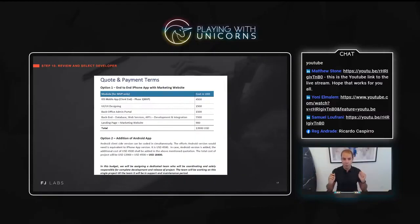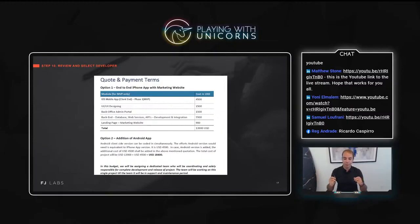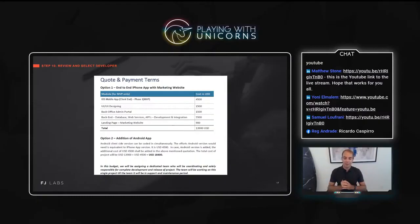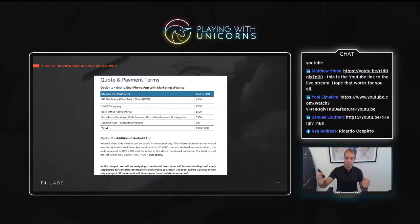The design came from the same development shop, but these two can be separated. This gives you a sense of a process that's replicable and can be used to build a minimum viable product for almost any idea. Almost everything can be built for really less than $50,000. In this case, for less than $20,000, you still have a lot of cash left — if you've raised $30,000 or $40,000 — to do testing on marketing and make sure that the idea works.